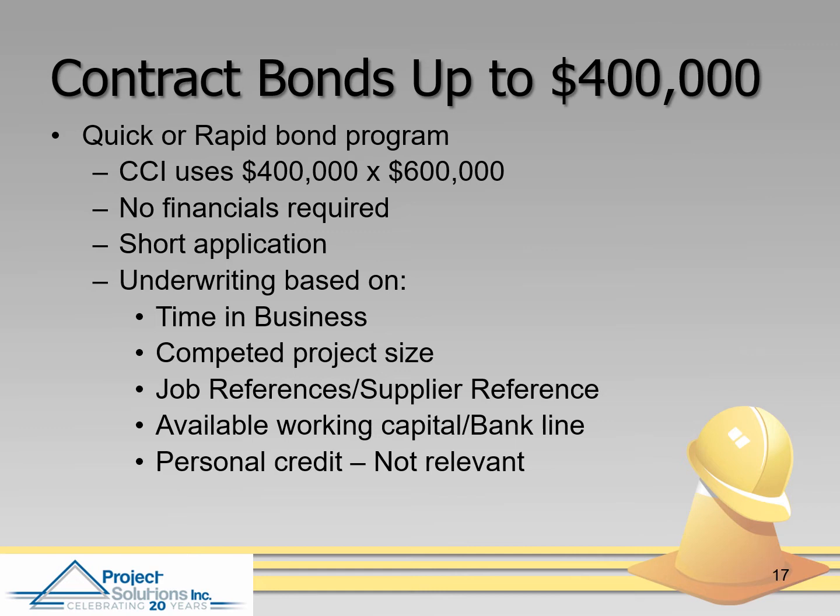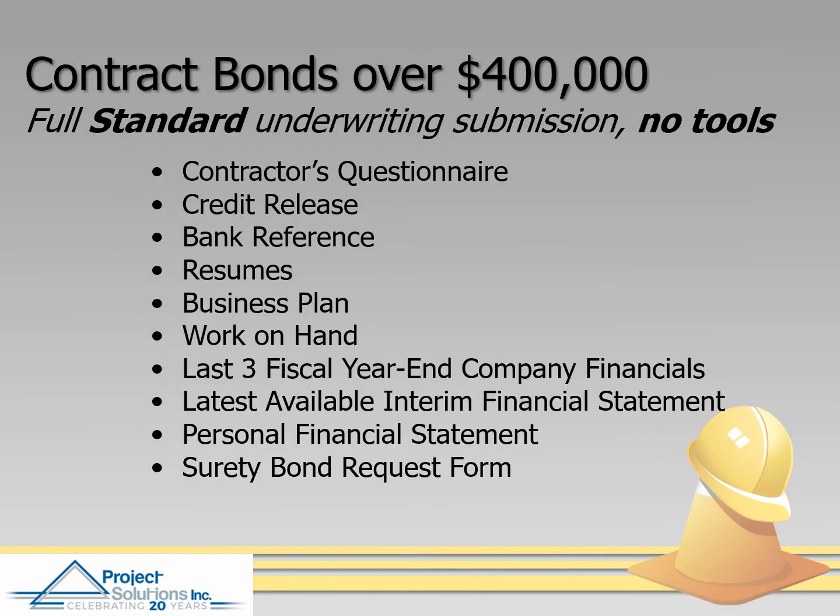But if it's over 400,000, which today most projects are over that, they'll have questionnaires, they'll want bank references, resumes, maybe your tax returns, financial statements, and the forms they want completed. So depending on the size of the bond, be prepared for that. Make sure you have good books well in advance before you make your appointment.